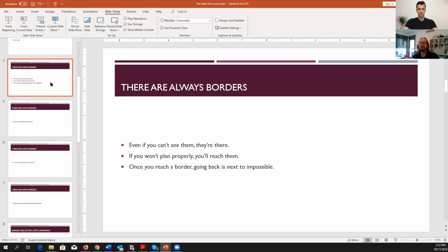And maybe you will be able to learn from this project and apply it in your next project, okay, this task will take me X+1 time and not X time, but that client and that project, well, that's in the past. That's usually our experience. So it's really important to put these limitations and define them really well. The more you break a task down to its bare minimums, the more you're able to quantify it. You are able to set buffers to it, all the things that we will talk about as we progress.